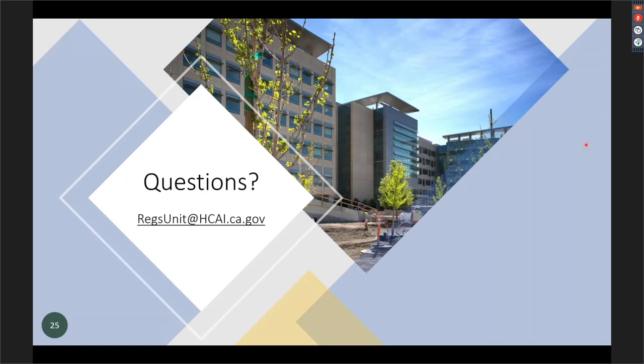If you have an RFI that turns out will require a change to the drawings, it can be either material or non-material. It does need to be converted to an NMA or an ACD, and then it will be looked at or concurred with or reviewed. We do not review the RFIs.